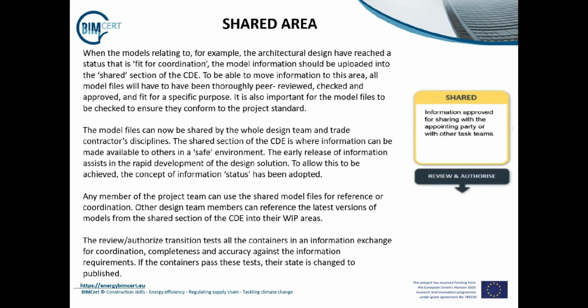The second key area is the shared area. So to recap, when the models relating to, for example, the architectural design have reached a status that is fit for coordination, the model information should be uploaded into the shared section of the common data environment. To be able to move information to this area, all model files will have to have been thoroughly peer reviewed, checked, and approved, and fit for a specific purpose. It is also important for the model files to be checked to ensure they conform to project standards. The model files can now be shared by the whole design team and trade contractor disciplines.